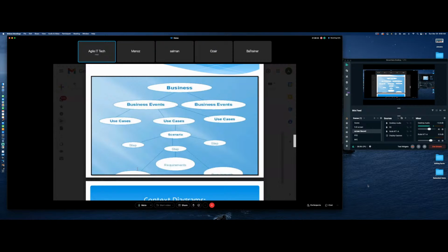And when do we need to make this? After completing the user story? No, this can be used as part of your storyboarding. This could be one of the boards. But remember, in the boards, you're not going to be developing use cases, right? So there'll be no use cases in boards. It's basically taking a bigger function and breaking it into smaller and smaller pieces. That's how we do that. Clear?